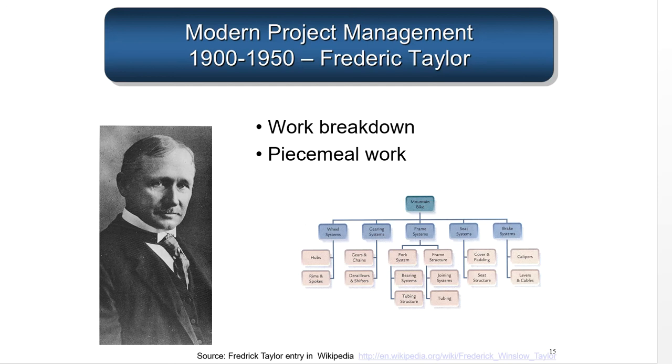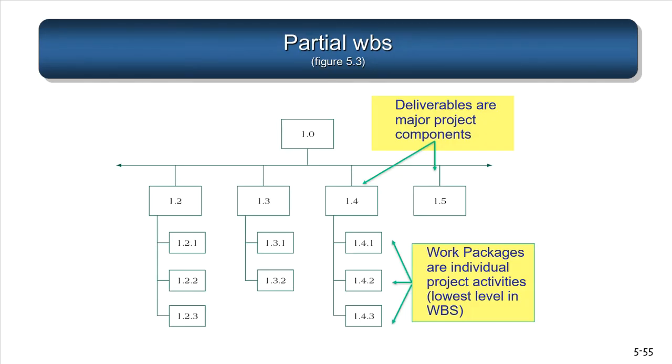And why is it done this way? Because the Project Management Body of Knowledge really wants you to first identify what your project will do, and then start thinking about the activities needed to be done in order to produce those deliverables. Because if you don't do it that way, there's always the danger that you're going to have activities in your project schedule that do not link specifically to deliverables. And when that happens, you may be doing unnecessary work. So if you think of what first, what am I going to deliver, followed by who, how long, how much, that's a better way to do it, which is why you begin with the work breakdown structure, and then after you have identified scope in detail in this way, then you add activities.